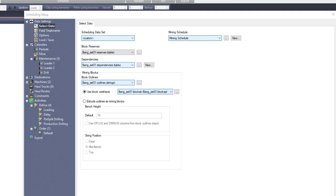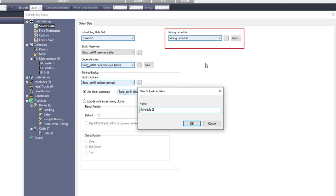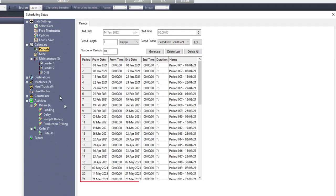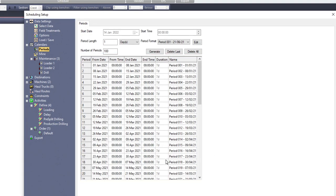Once the dataset is loaded on the schedule ribbon on Studio OP, it is compulsory to create a mining schedule as well as a scheduling calendar before you can attempt to link Studio OP and EPS together.